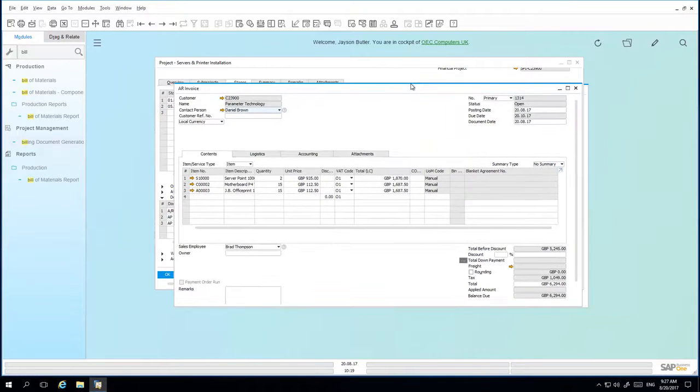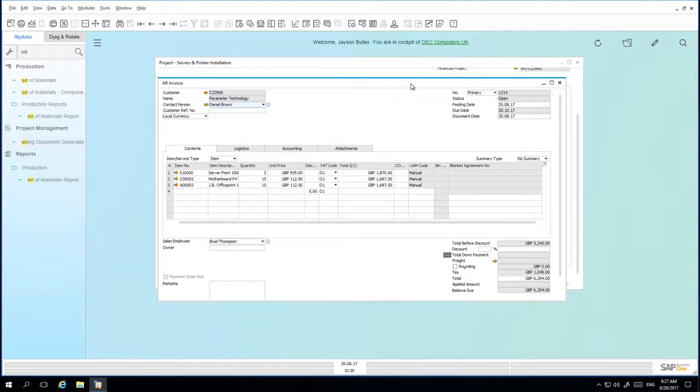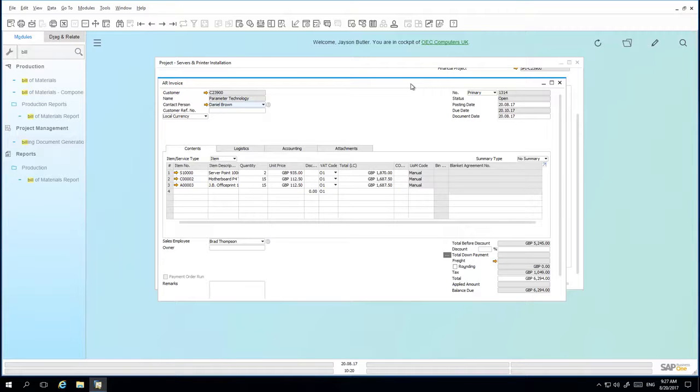What we can see here now is an AR invoice is then generated, which will then be assigned directly to the customer. So once the AR invoice is then generated for this customer, the line in the project stage will be closed and it won't be able to be invoiced again.